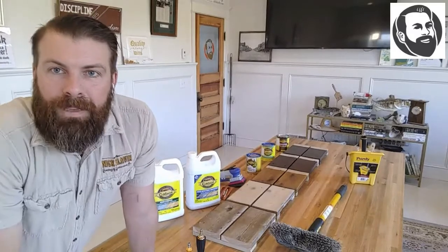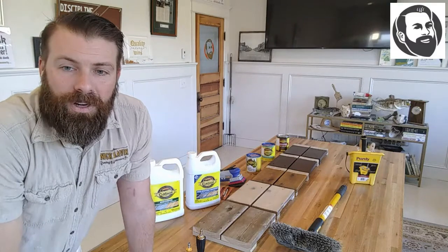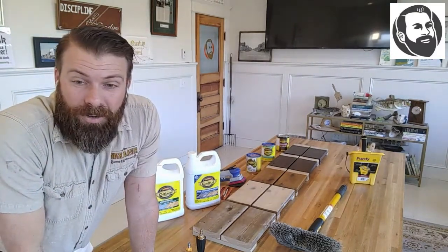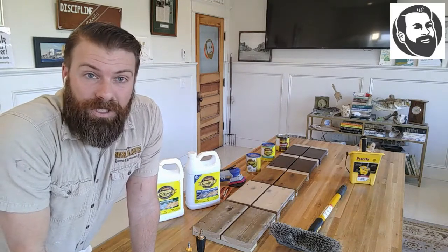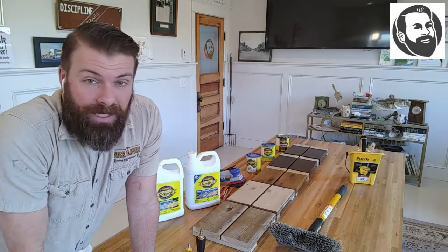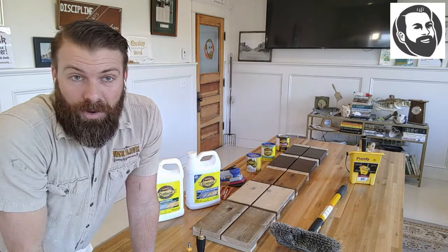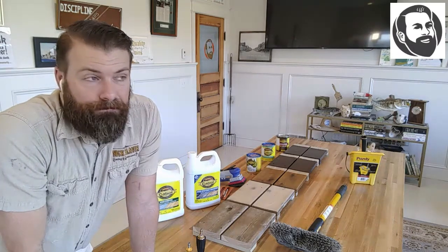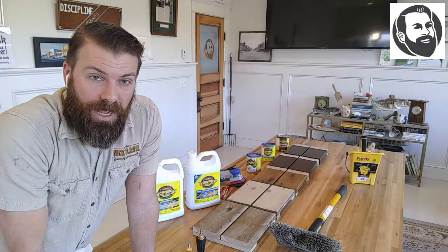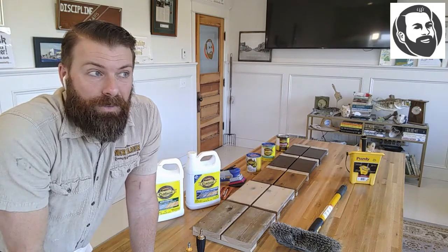Oh, here we go. Mike, have you heard anything about the paint shortage crisis? Just wondering if it's affected your business. It has ours. So yes, about 6 weeks ago, my paint reps and I, we sat down and we made first, second, and third order contingency plans for anything that we needed. So far, because we've had these plans enacted, we've always had backup plans for all of our coatings, proven coatings, because we test a lot of them. We've only had 1 week where a couple days, one of our wall paints was not available. So we went to our second contingency plan, moving on. And we've had great success with this.